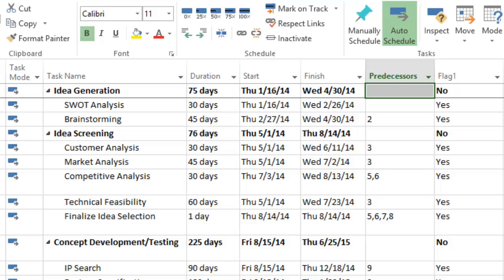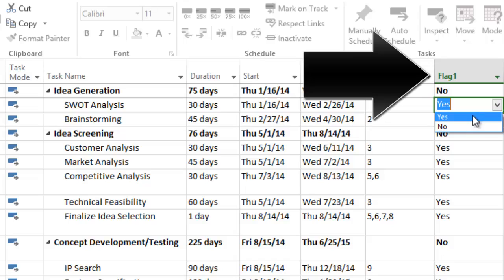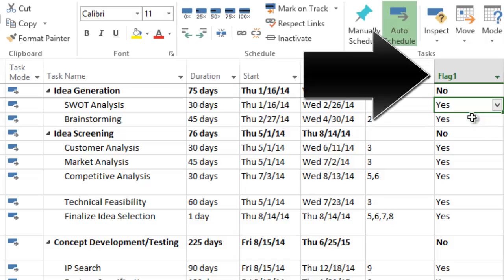To use OnePagerPro, we next need to select which individual tasks and milestones we want to import into the summary level timeline. We do this using a flag field, flag one in this example, where we have put a yes beside each task we want to be visible in the OnePager document.